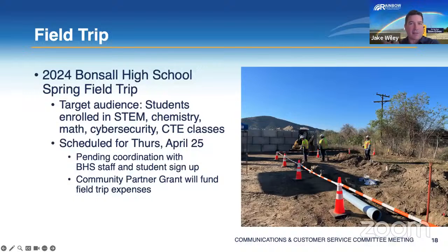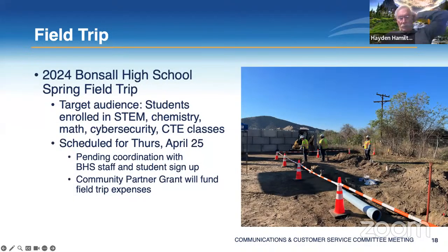I think the second is probably closer. It's about a 3 hour, 3.5 hour event and 10, 12 people. So you're probably looking at 50 hours, plus prep time, the actual event plus prep time.